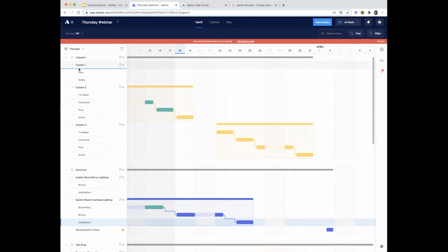Packages are a custom way of organizing work, a bit like organizing files into different folders. But really simply, packages are probably how you talk about the work actually out on site. So rather than saying something like, I think we're making really good progress on part 1.2.4.5 of the plan, guys, you'll probably be more likely to say, we're traveling well through the columns. So you can make as many or as few packages as you want to really sort of translate that WBS into an understandable, usable language for all of the guys out on site, or maybe if you're in the delivery team, this will be particularly useful for you.